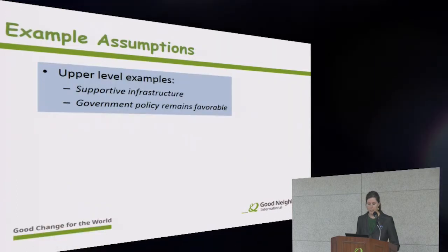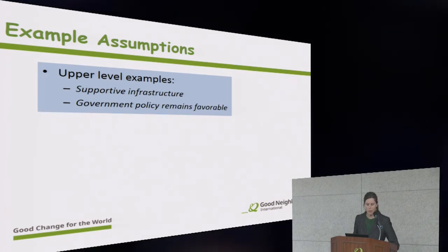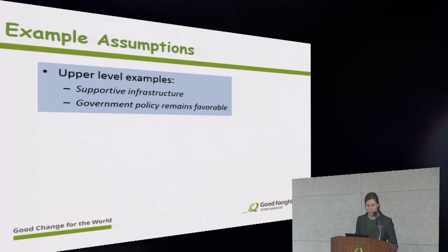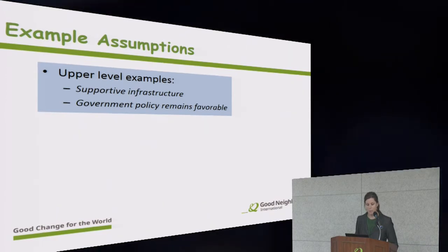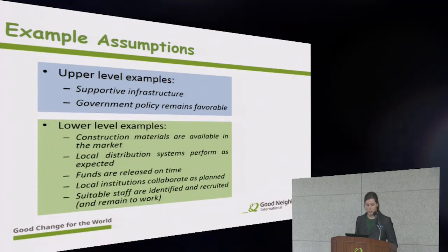Here's some more example assumptions. So at the higher levels of the log frame, maybe the outcome level, you might have assumptions such as supportive infrastructure is in place, government policy remains favorable, and here are some lower level examples.